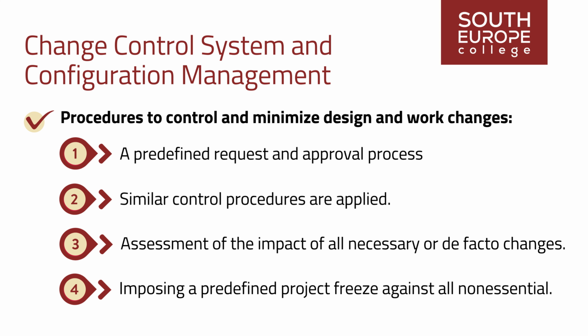Imposing a predefined project freeze against all non-essential changes at a specific phase, preventing alterations to the design to facilitate the commencement of the next project stage. This process ensures that all design and work changes are documented regarding their effects on work orders, budgets, schedules, and contractual prices, undergo formal review, and are ultimately assessed for acceptance or rejection.